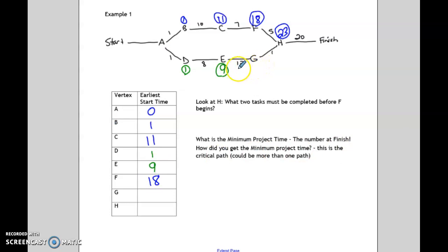From there, I'm going to put the noodles in and boil them, and that will take 12 minutes. So 9 plus 12 would be 21. Okay, so before I can drain the noodles, I will have spent 21 minutes. And then we're going to drain the noodles. That'll take a minute. So before I can get to eat, it's going to take 22 minutes for the noodles.